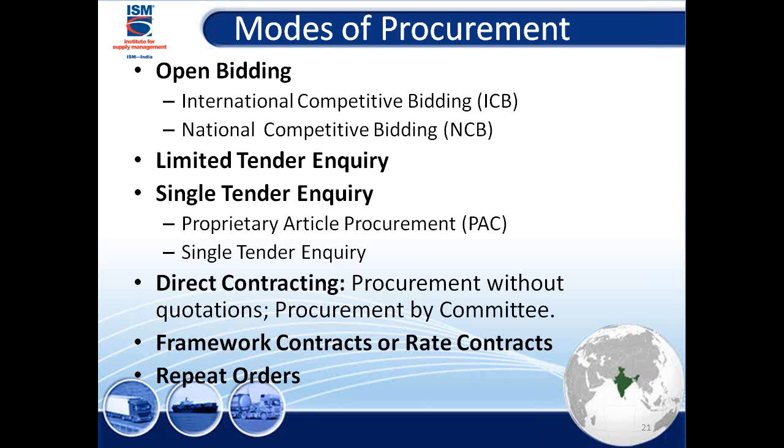Direct contracting is more like without getting quotations. Some emergency has come up, some disaster has come up, I may do direct contracting. Or sometimes there's a committee of people who go and buy together. So one person from finance, one from procurement, one from the user, they go and buy. But then there are thresholds.